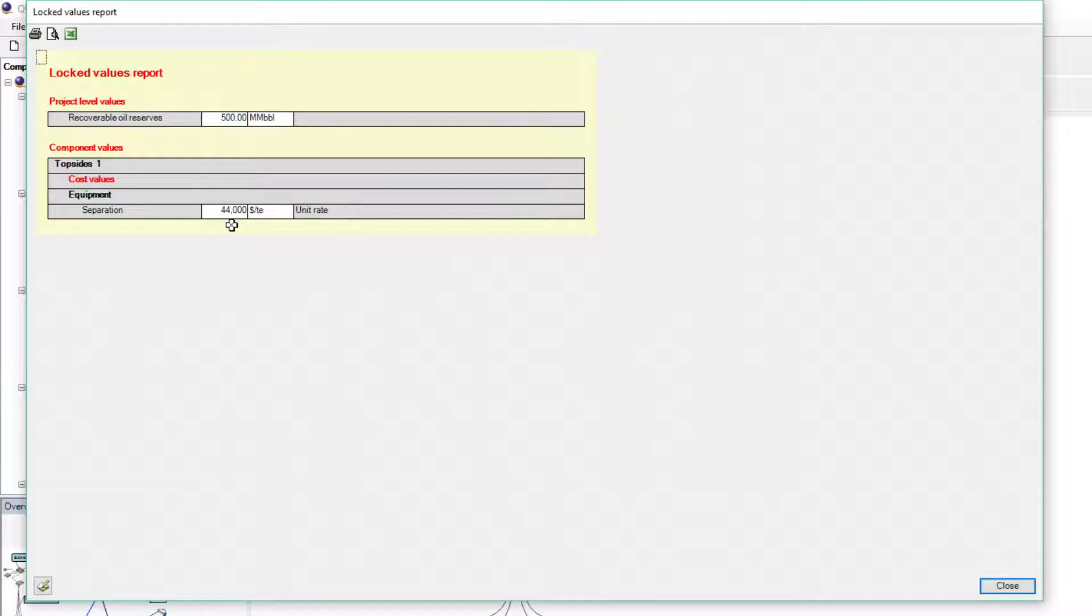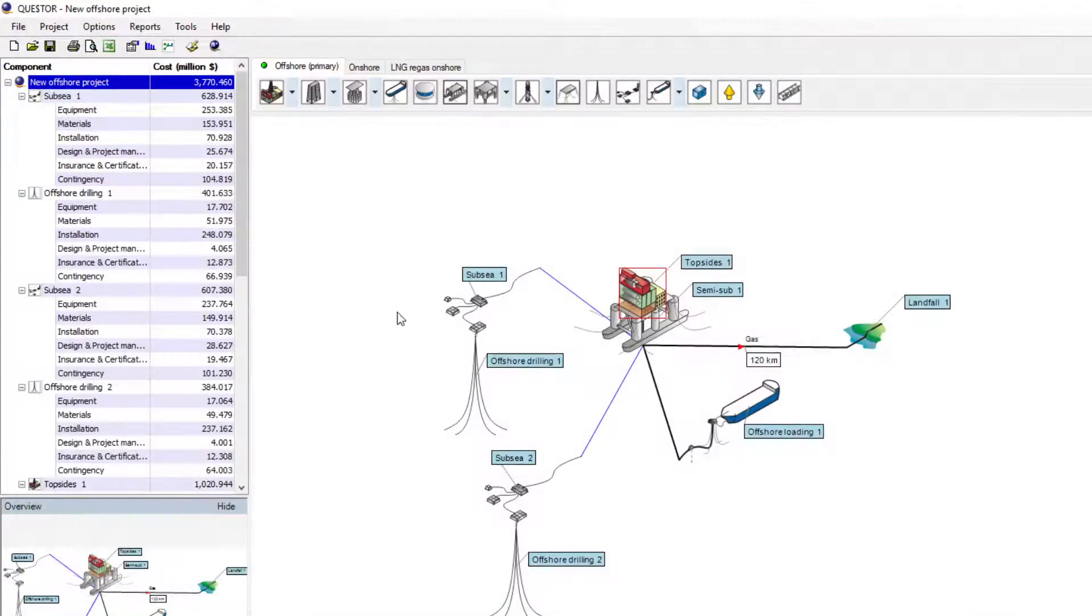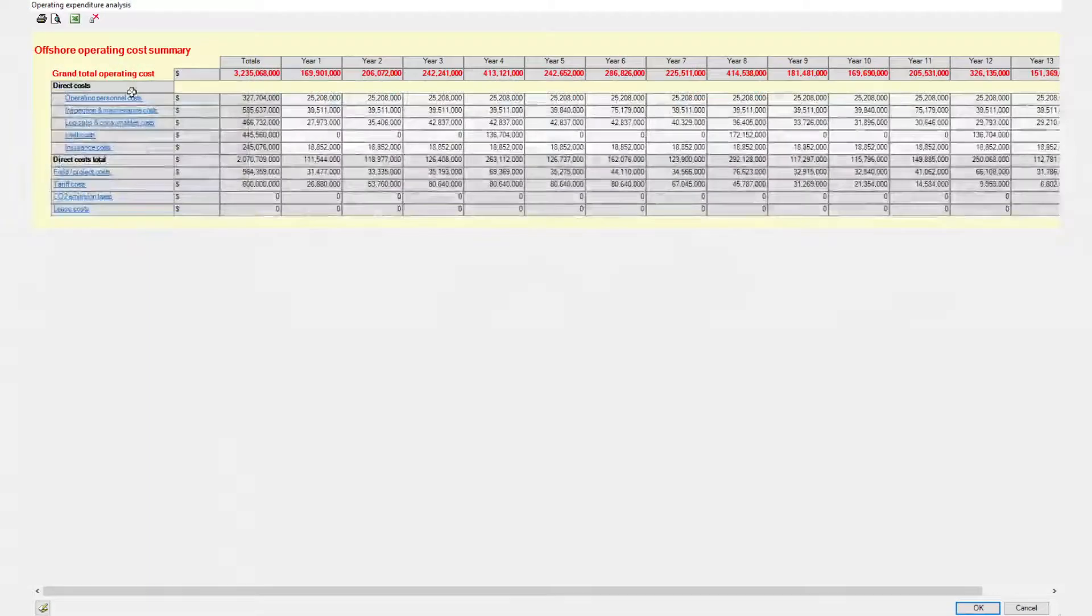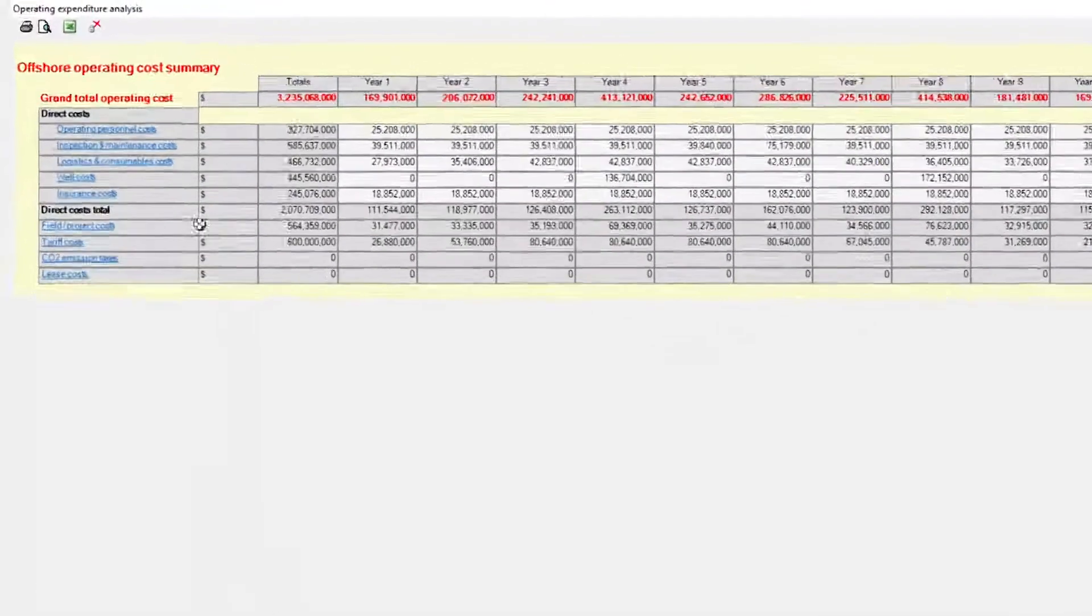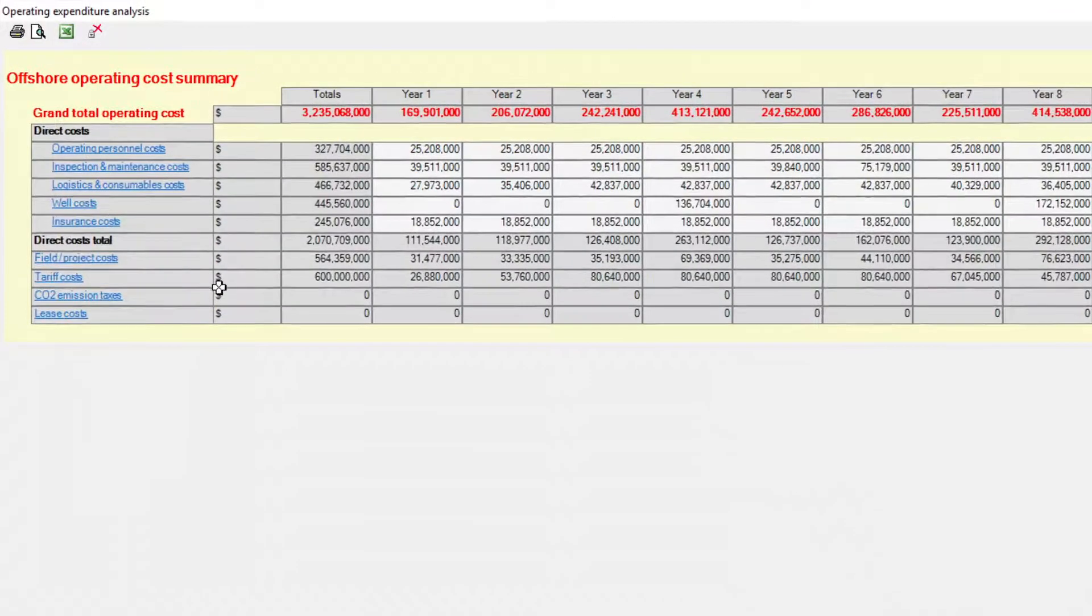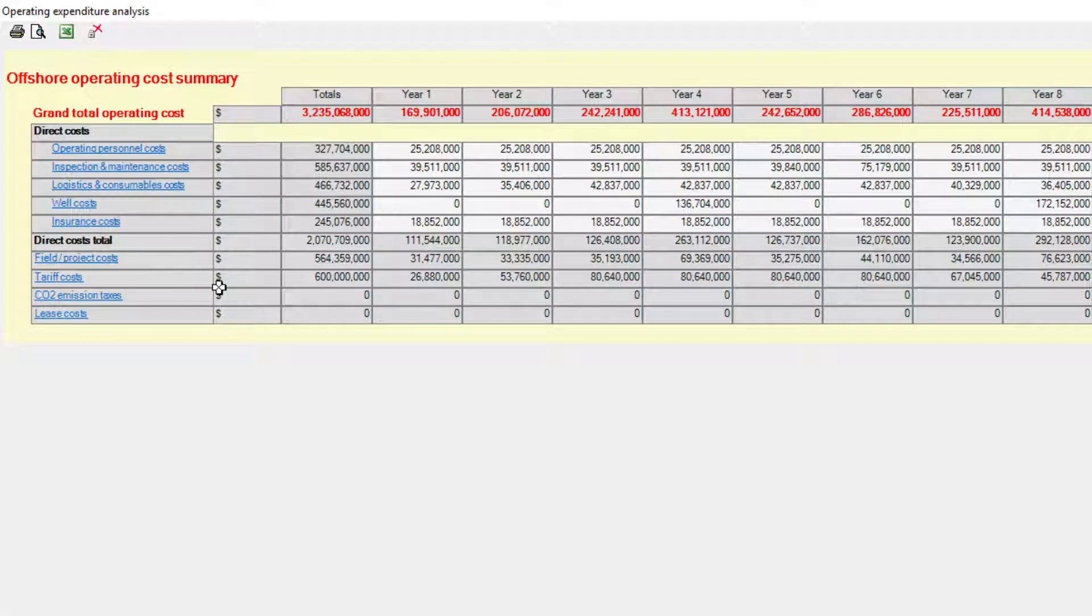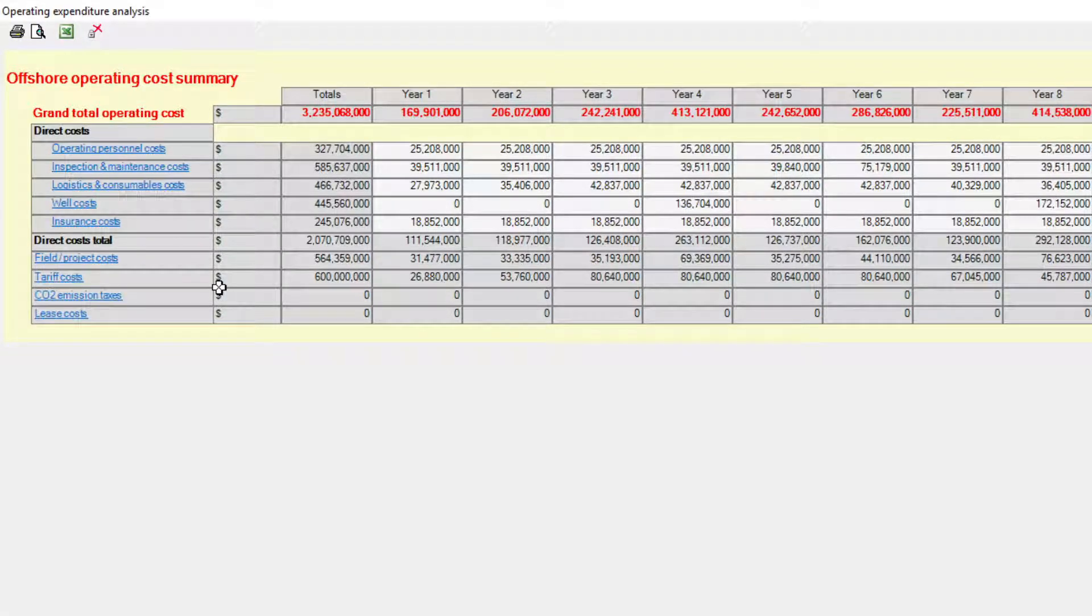The operational expenditure is estimated for the entire production life of the project. The main cost centers are personnel costs, inspection and maintenance, logistics and consumables, well maintenance and insurance, field and project costs, tariffs, CO2 taxes, and lease costs.